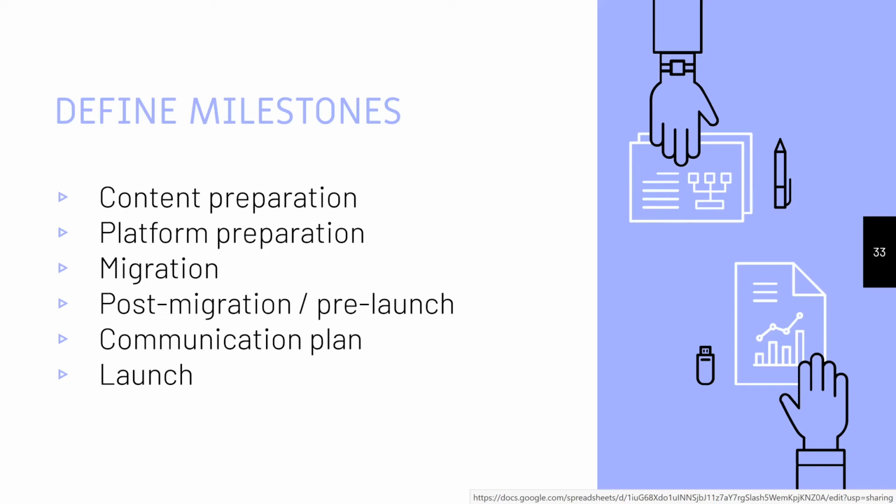We have a dev to staging to prod workflow for changes in our new institutional repository. Part of the learning we needed to do was how to make configuration changes in a development instance, make sure they work, and then move them from development to staging to make sure the process worked.